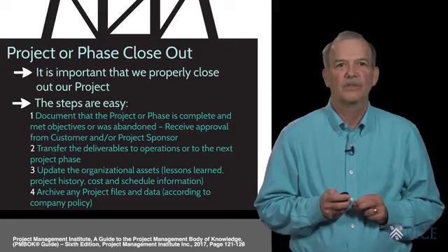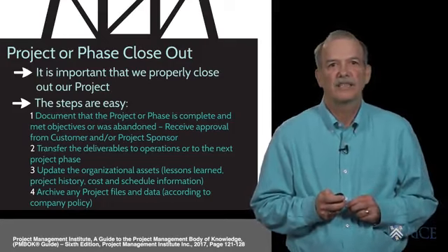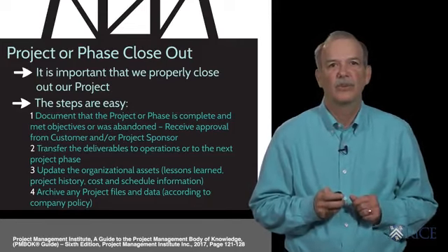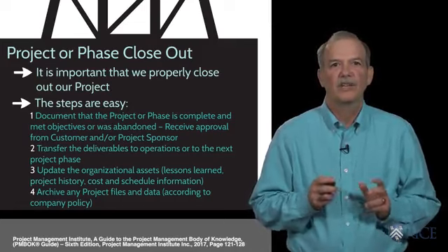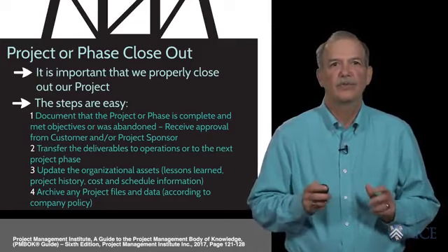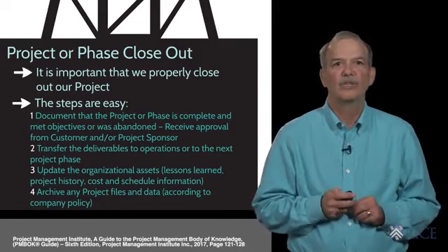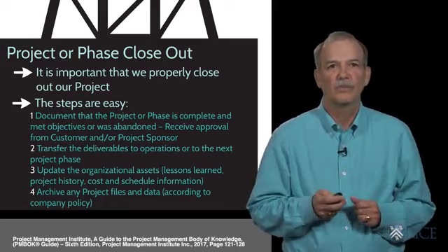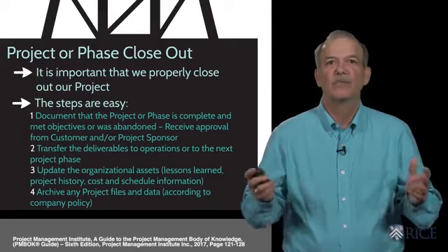Transferring the project deliverables to the final users. Capturing lessons learned and project history to aid with the estimating and executing of future projects. And finally, storing the project documents in the organizational archives for future reference. This is key as they may be needed if future questions arise on performance or whether you met the requirements of the project. This final step is one that many of us overlook.